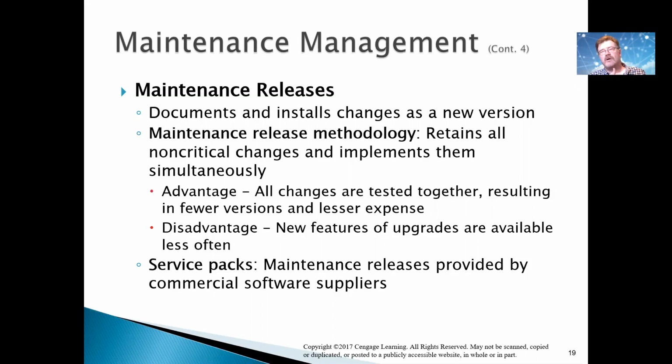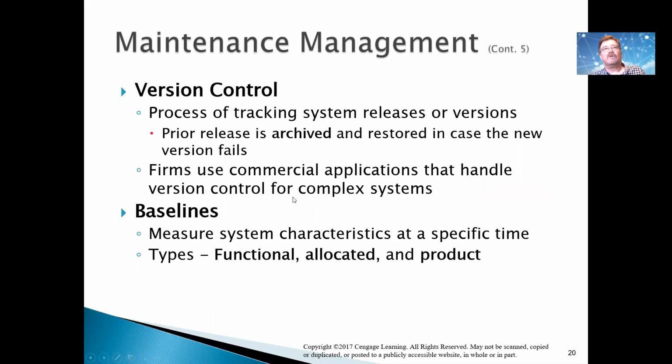I basically have to make sure my code freezes lasted from about a week before the end of the quarter to 2 weeks after. So I had basically 3 weeks, and during that time, it's not like the developers didn't do anything. They were working basically on the next release. So that's the idea of a bit of discussion about releases, version controls.